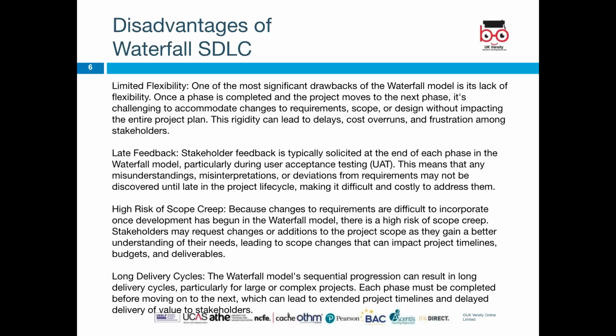There's no advantage without disadvantage. We have to look at the disadvantages. So what are the disadvantages of waterfall SDLC? Limited flexibility. One of the most significant drawbacks of the waterfall model is its lack of flexibility. Once a phase is completed and the project moves to the next phase, it's challenging to accommodate changes to requirements, scope, or design without impacting the entire project plan.